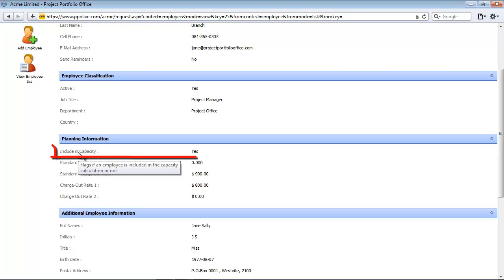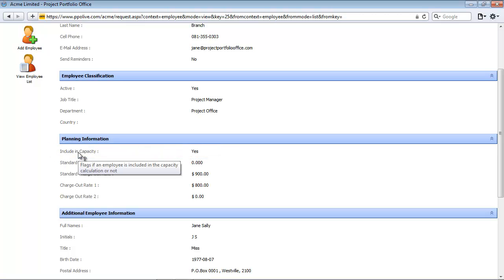All these fields within this section relate to the resource capacity planning. The first field is the 'Include in Capacity' field. This field indicates whether the employee should be taken into account for resource planning. Users may want administrative or temporary staff to be excluded from resource planning calculations. This can be done by making the 'Include in Capacity' field false, or simply unchecking it for this employee's record.